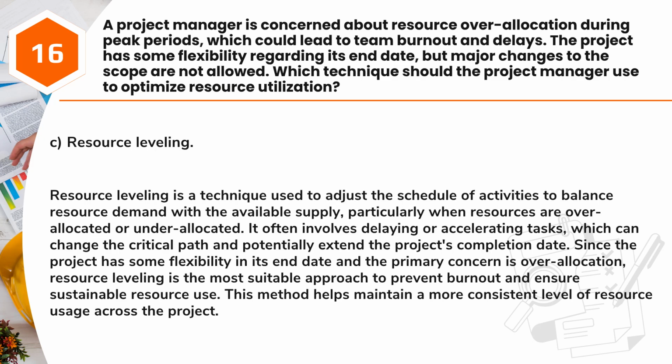Answer: C. Resource leveling. Resource leveling is a technique used to adjust the schedule of activities to balance resource demand with the available supply, particularly when resources are overallocated or underallocated. It often involves delaying or accelerating tasks, which can change the critical path and potentially extend the project's completion date. Since the project has some flexibility in its end date and the primary concern is overallocation, resource leveling is the most suitable approach to prevent burnout and ensure sustainable resource use. This method helps maintain a more consistent level of resource usage across the project.